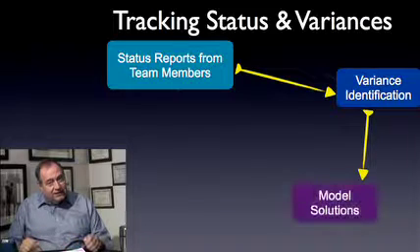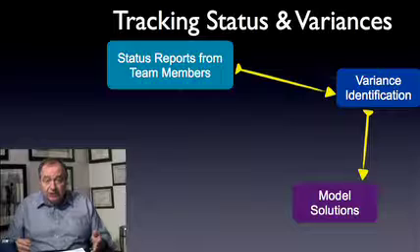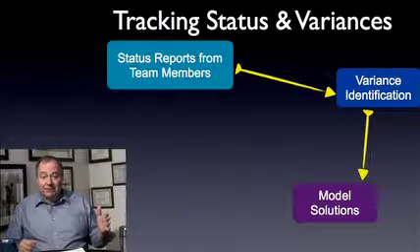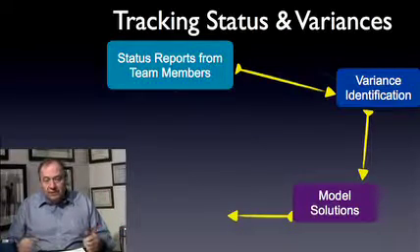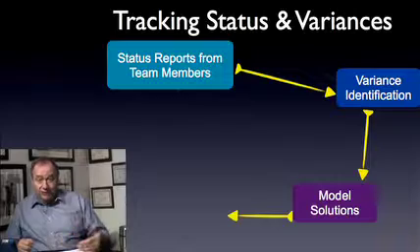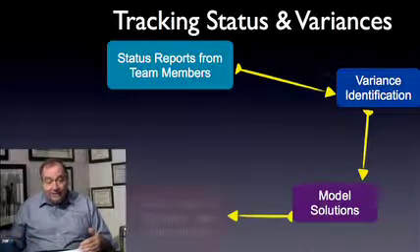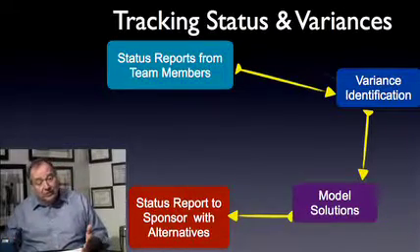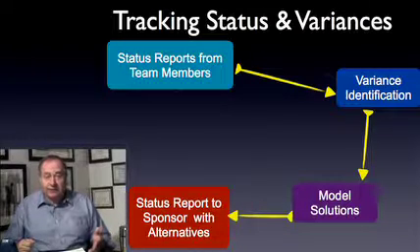This is not to say that every team member on the project shouldn't know how things are going. They should. But we can accomplish that very quickly by sending them a copy of a tracking report, the tracking Gantt. And that shows them the comparison between the planned duration of every task and the actual duration that's forecast. So it lets them know what's happening on their current and future assignments without taking hours of people's time in a meeting.